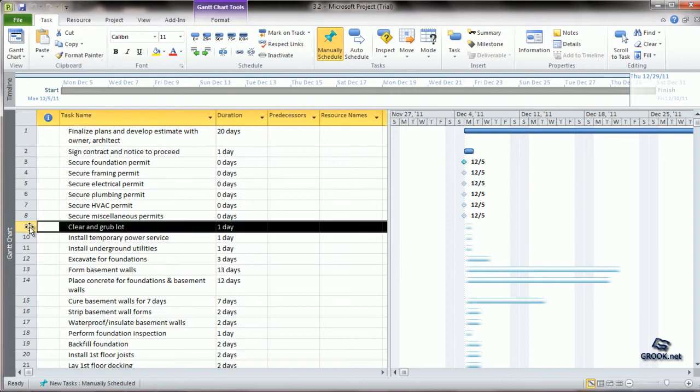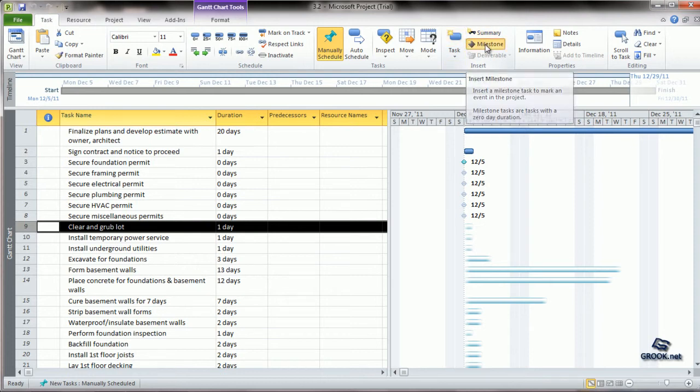You click where you want to add the milestone and then go to the task tab, go to the insert sub tab, and click on milestone.